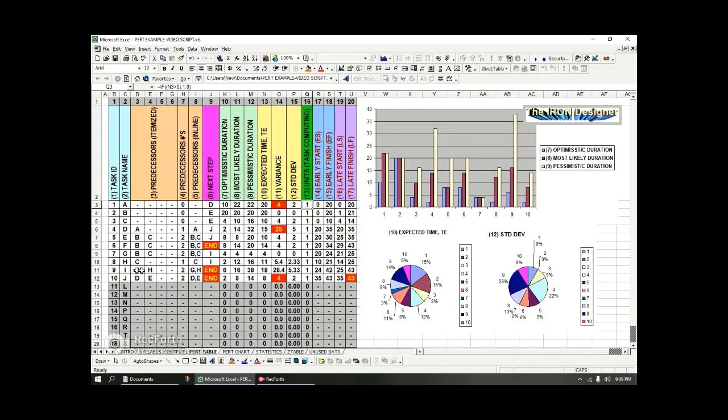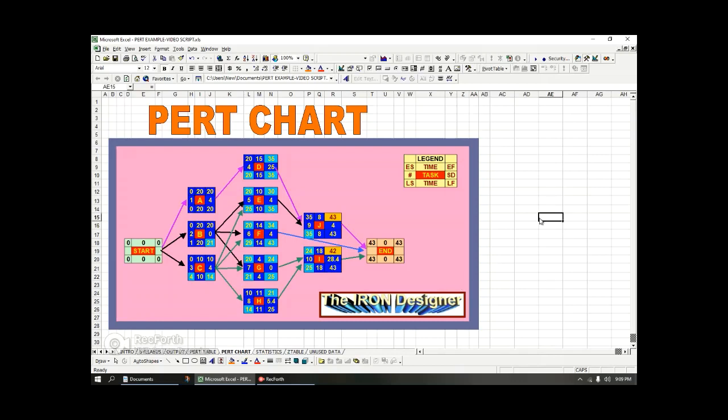And the problem with number 9 is that these predecessors could cause us some issues. G and H, which were 7 and 8. So here 7 is not really an issue causer, but 8 could be a big cause of issues, and it could really cause 9 to stumble and fall.